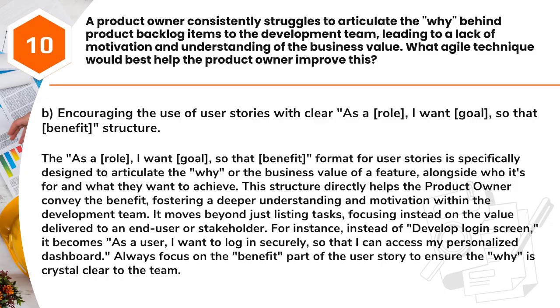It moves beyond just listing tasks, focusing instead on the value delivered to an end user or stakeholder. For instance, instead of "develop login screen," it becomes, "As a user, I want to log in securely, so that I can access my personalized dashboard." Always focus on the benefit part of the user story to ensure the why is crystal clear to the team.